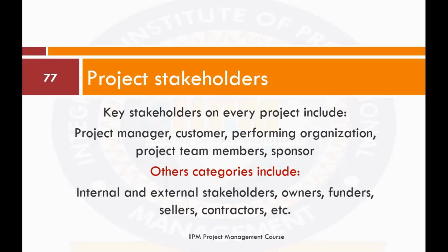Just the understanding or knowledge of that stopped the project. We didn't go to Zambia because we had to say, if we must come, then we have to make the budget in dollars so that nobody is losing. Since they didn't agree that the budget should be done in dollars, we remained in Nigeria and they remained in Zambia.